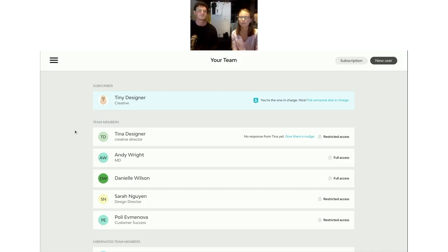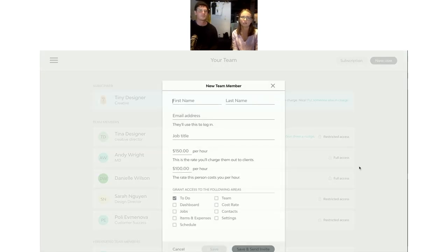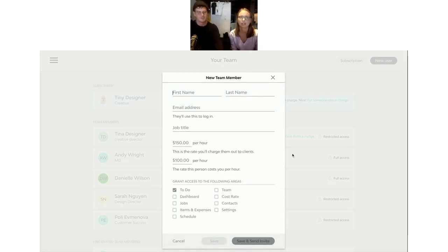Yep. So invite your team members in. Let's invite someone, for example. It can be Andy Wright. He's already in there. I'm not in here, so maybe let's go Honey Morgan. You can add the email address, the cost rate, and sell rate. Extremely important to add that in. That's where you will be charging your jobs correctly, and then actually understanding the profitability of your jobs with those cost rates.